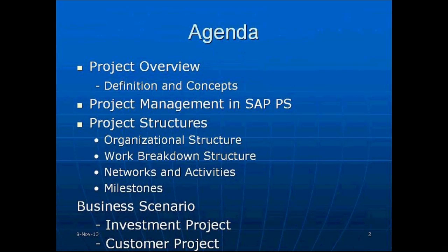In the customer project, normally we look at each and every activity, and we can see where we can make cost reductions. In a customer project, I am going to check the revenue, how much money I am going to get after selling this project. There is no revenue calculation in an investment project, because I am doing the investment for my own company or my own business. But in a customer project, I am selling, so revenue is important.